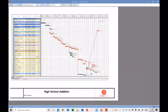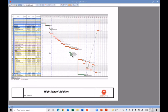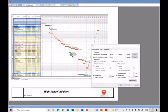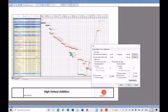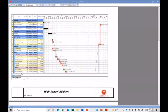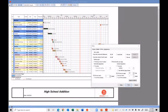A couple of things that will help. I just cleaned up those items. You can customize how many lines are going to fit within this box. I can set those up like right here. I can say how many lines I want in my print options. Let's go in here and I can go into scaling. So I can say, right in here is where I have my date zone. So I can set my customized, but right down in here, I can say, I only want 20, let's say 25 rows in my schedule per page. Notice how it made those a lot bigger. So now I can see that it's, and it's only got down to line 25.